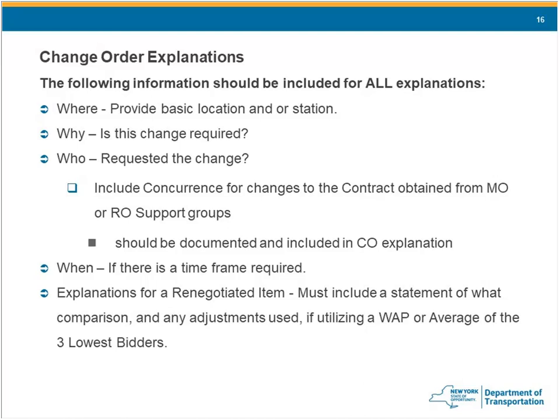Yeah, and I tend to look at both the percent increase and the money, because if we're talking about a small item that is 200%, yet it's only $500 or $1,000, I'm not gonna work real hard trying to chase down a better explanation for $1,000.